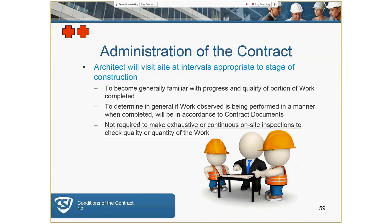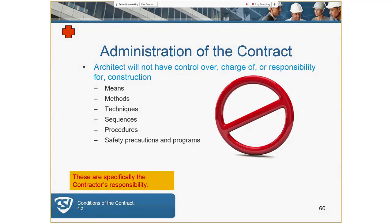During depositions, one common topic is how often the architect visited the site. The architect is not required to make exhaustive or continuous on-site inspections to check the quality or quantity of the work — just needs to be generally familiar with the progress. Architects observe; they don't inspect. The architect will not have control over means, methods, techniques, sequences, et cetera — these are specifically the contractor's responsibilities.